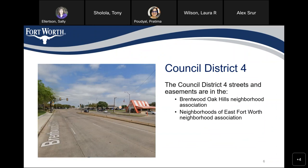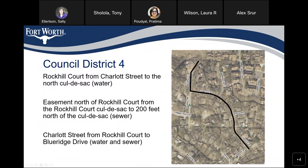We are going to talk about the different segments in different districts. The first one is in Council District 4, in the Brentwood Oak Hills Neighborhood Association and Neighborhoods of East Fort Worth Neighborhood Association. On Rock Hill Court, we are going to replace the water line from Charlotte Street to the cul-de-sac, and from the cul-de-sac northward we are going to replace the sewer line, which is in easement. On Charlotte Street from Blue Reef Drive to Rock Hill Court, we are going to replace both water and sewer.